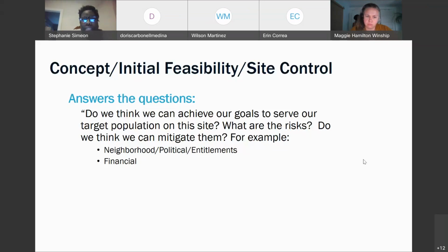You want to ask yourself, what are the risks? That's when knowing the history of that community, knowing that neighborhood, is vital, because just because it's vacant doesn't mean that it was not a funeral space. It wasn't an old gas station. We ran into things where they were like, oh, there was an old printing press here. What? Since when? Also, when you're getting things from a municipality, their title is clean, but when it gets to your hands, it may not be so clean. So you've got to know what the risks are. And depending upon how far back you go for your title search, the more money you spend.